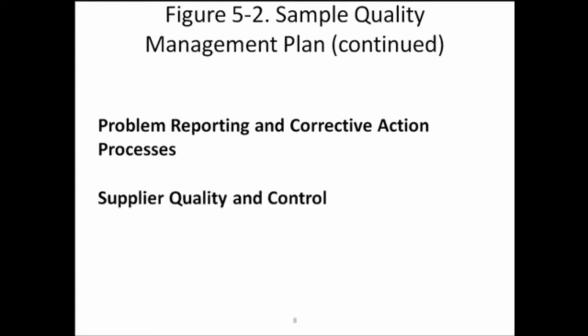You'll need to define how you're going to handle supplier quality and control. The project manager will closely monitor work performed by suppliers with assistance from our supplier management department. All contracts must clearly state quality standards and metrics.